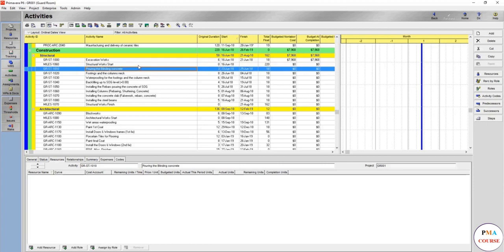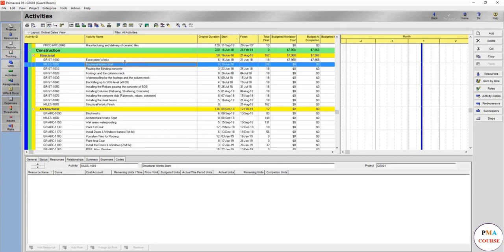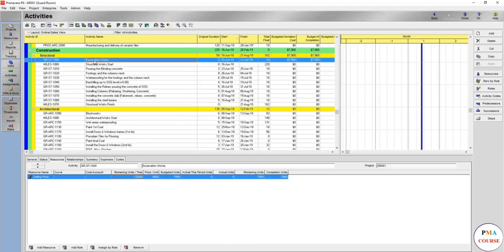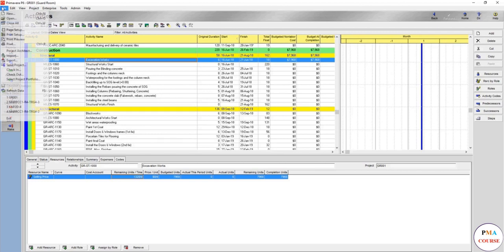So instead, we can make it automated and much easier. Also, one more thing: the milestone - you cannot add resources. It's a milestone that just shows an event. So how to make it automated? Now, we have at least one activity which is resource loaded. Then you are going to use the power of export and import and the power of Excel.